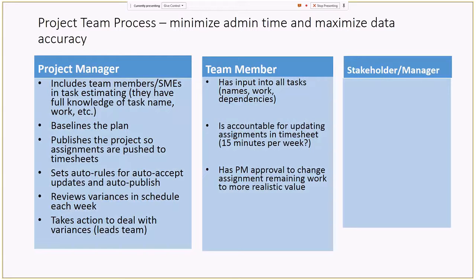But if I'm on a task and you're the PM and you say, yeah, I know we scheduled 4 hours for this task, you can change the remaining work. You change it, but is it auditable? Does it show up anywhere? Can you report on that? Through variances. Variances would be the way that you see those changes. You kind of see the shift. You would call the person about the shift and the task.